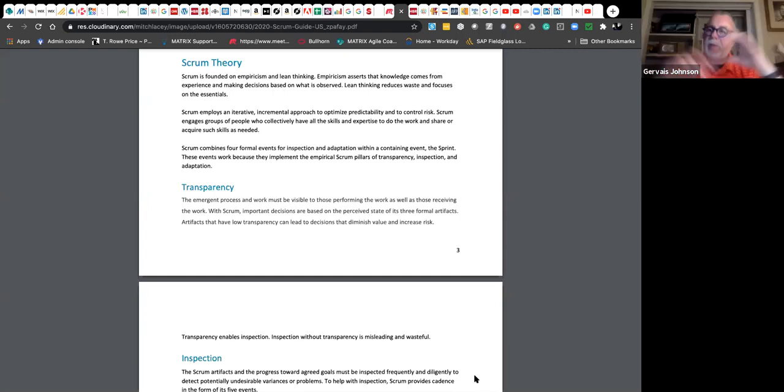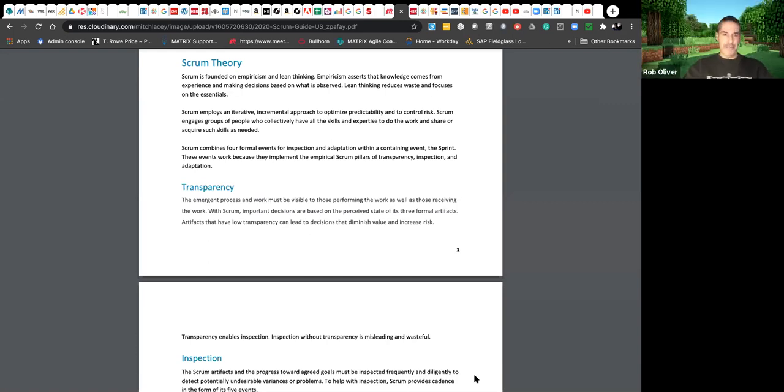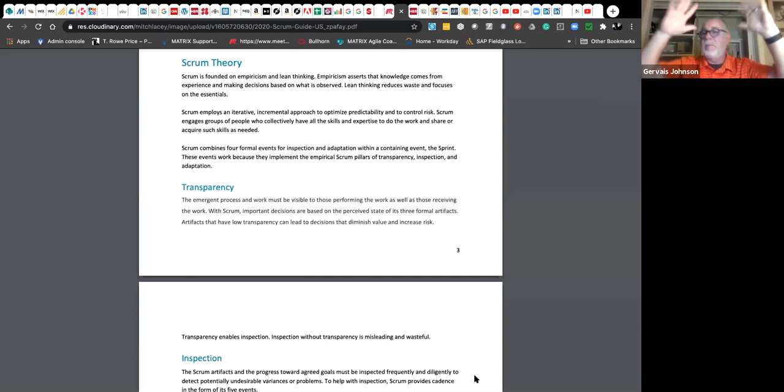Yeah, we used to do sprint goals. We used to put them on the wall, a big sprint goal for this sprint. Sometimes our sprint goal spanned two or three sprints. For a policy admin system, our goal was to get the initial customer identification done over the next two or four weeks. We'd break out the features and stories, but that was all of our focus, a major functionality we wanted to get out to UAT.